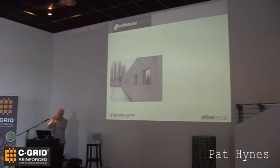We would have probably put more connections. We had to go in and retrofit connections up in the corner here because we had problems there. And I would probably put a few more connections on top. I always say it's the centipede effect. Instead of having one strong person, you have a centipede with a whole bunch of smaller legs that carry more weight or less weight, but more of them. And so that's what we'll do on the next one when we have this parapet problem.